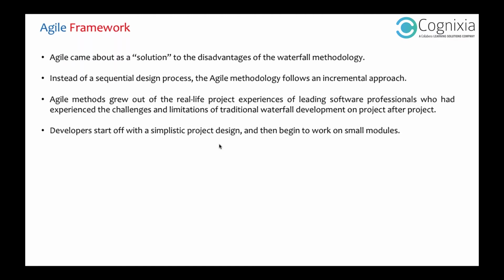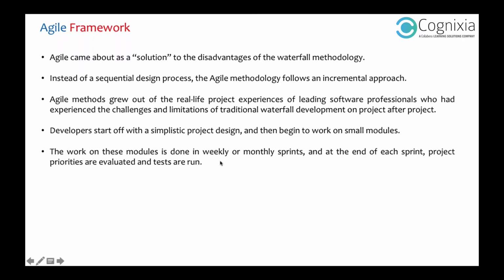So that's the best approach, right? Once the client says, okay, this looks good, you start doing the coding behind the scenes. We call these smaller modules. We do not write a single module that does everything. Take examples like makemytrip.com or flipkart.com: there are multiple modules doing multiple different jobs, not a single software application. These modules are done in weekly or monthly sprints, depending on the company, and tests are run.